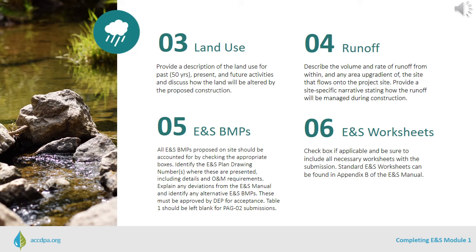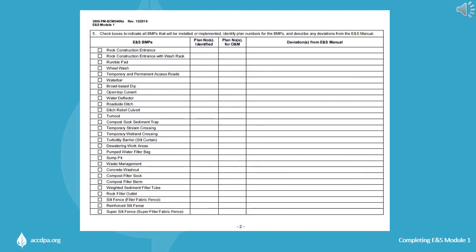Item 5 takes up two pages of the module and has a list of almost all of the standard ENS BMPs found in our BMP manual. All ENS BMPs proposed on site should be accounted for by checking the appropriate boxes. Identify the ENS plan drawing numbers where each BMP is shown on both the site drawing and the details page, and include the sheet number where O&M requirements have been listed. Explain any deviations from the ENS manual and identify alternative ENS BMPs. Any alternative ENS BMP proposed must be accompanied with documentation stating it was approved by DEP prior to submission.